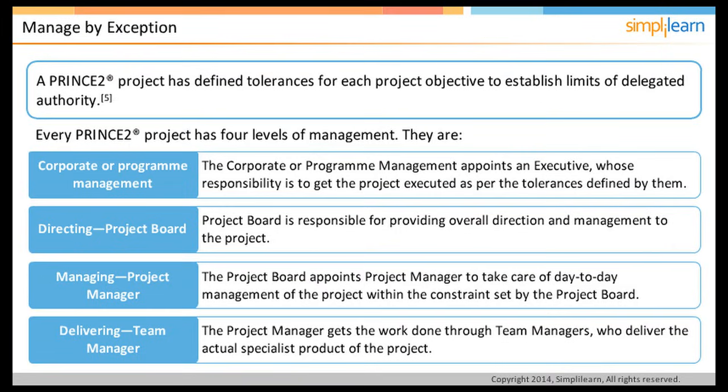However, he would expect regular progress reports from Ms. Julie. So this principle provides a very efficient use of senior management time. The senior management, including Mr. Smith and corporate management, should be available for guidance and ad hoc directions whenever the project team needs their help. So the senior management directs, the project manager manages day-to-day work, and the team managers deliver the project, which means they deliver the specialist product of the project.